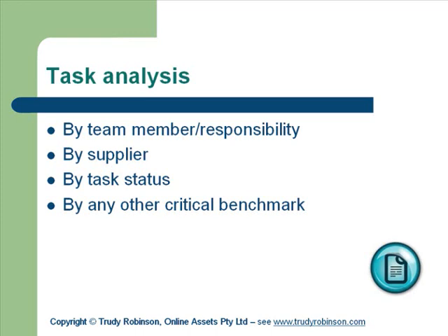Once we've got that work breakdown structure updated, so somebody's come back and said, okay, yes, I've finished that, I'm halfway through that, that one's not going to be started until next week, and they've gone through the tasks, then we need to be able to do an analysis of those tasks. So you can turn around and say, I want to see all the tasks allocated to Santa Claus and see how many he's got done and where he's outstanding, and compare it to when he was meant to get things done and where he hasn't. That's when you start looking at the feedback.